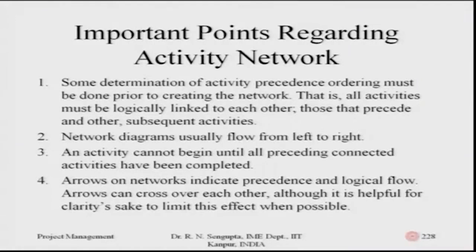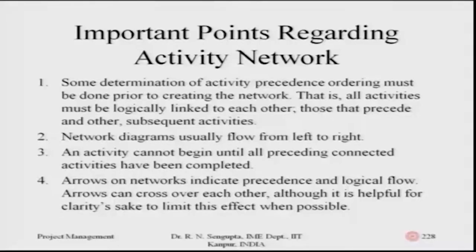The network diagram usually forms from the left to the right. If you remember the decision tree diagram, on the left we had the start of the total decision process, and on the right was the end. An activity cannot begin until all preceding connected activities have been completed, which is very important to know. Arrows on the network indicate precedence and logical flows. Arrows can cross each other, although it is helpful for clarity to limit this effect when possible, because criss-crossing would make it much more confusing.